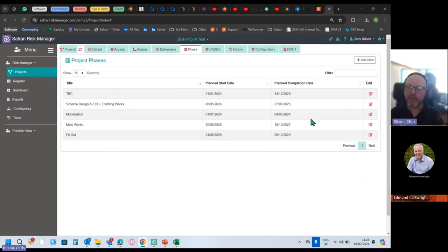You can map risks to these and inherit the phasing, as this is the time of the project that it could hurt us, so that you only edit. So if there's change management on a project, and there will be, projects are just in constant flux and change. So the client says, here's the new scope that I need you to add into the project. You go, fine, that is going to increase the design phase of the project. It's going to knock everything out.